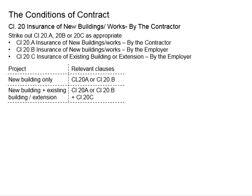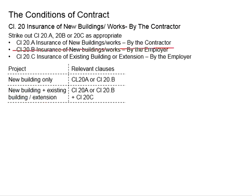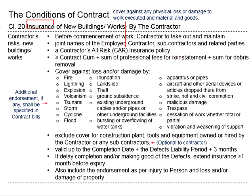Now let us look into the details of Clause 20. Clause 20A relates to the insurance of buildings or works by the contractor, and is applicable when Clause 20B has been struck out. The clause requires the contractor to take up and maintain insurance before the commencement of work, in the joint names of the employer, contractor, subcontractors, and related parties. This insurance will be the Contractor's All Risk insurance.